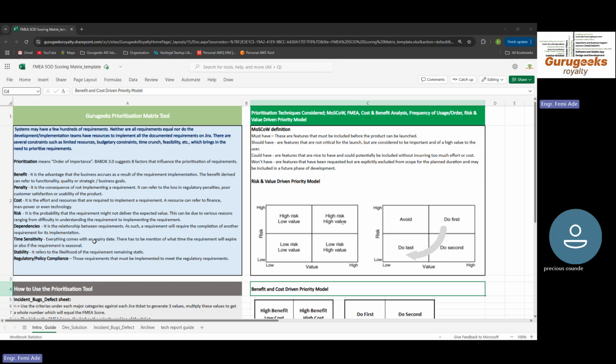The thing is that depending on whatever you're working on, it could be a wedding, for instance. Imagine you're planning a wedding and you decided to make a list of all kinds of things. In a typical African wedding, particularly Nigerian, you have engagement, you have introduction, you have the church wedding, you have the reception. So let's imagine that all your epics are the ones I've just mentioned. Your engagement is an epic, your introduction is an epic, your church wedding is an epic, and your reception is an epic. Under each epic, you have your stories.